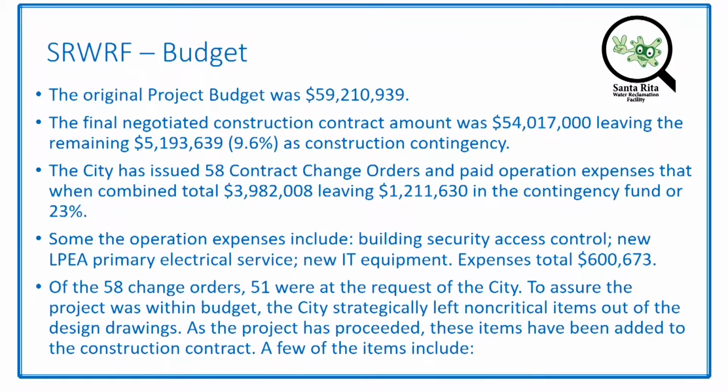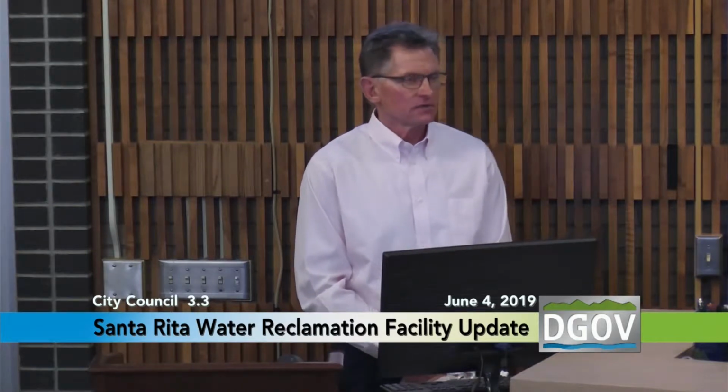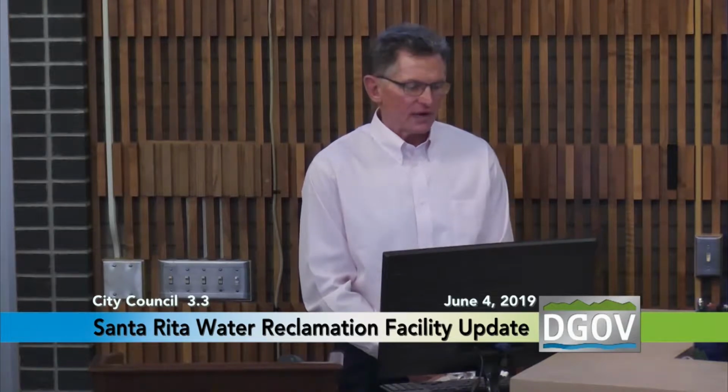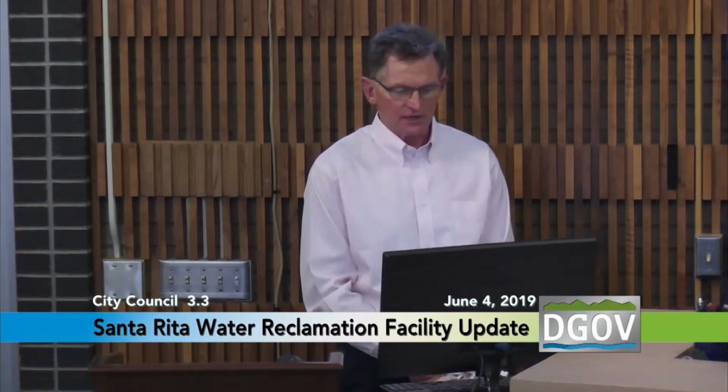Just as an example, some of the operation expenses included: we are paying for all the building security access, to make sure that the site and every building has security, so that no one can get into the plant to do any harm to the plant or themselves. Also, we had to reset the primary electrical service from LPEA, which was fairly expensive. We bought a bunch of new IT equipment for the project, and all of these expenses totaled a little over $600,000. Out of the 58 change orders that we've issued, 51 were a request directly from the city.